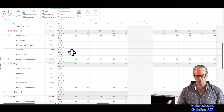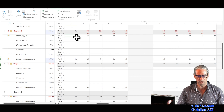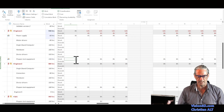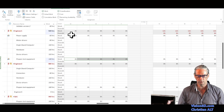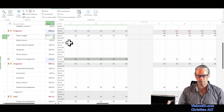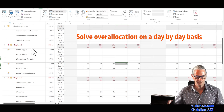This is one way to proceed. My proposition is to extend this to the other four days of the week. I come here like we would do in Excel and extend those values, then do the same for the other task. For this week we have no more over-allocation, and the work has been reduced for power supply from 80 hours to 60, and for prepare test equipment from 160 hours to 140 hours.